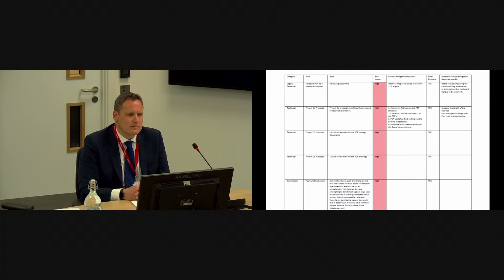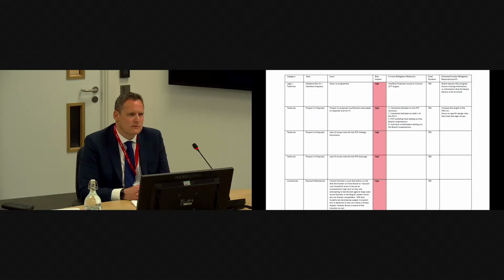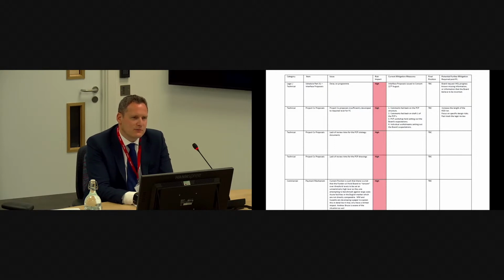By the time financial close was reached, were you concerned about the volume of reviewable design data? Was it more or less than you would have expected on a project of this nature? It was a lot more than we would normally expect. Okay. And would that have been a concern to you, just simply the volume of reviewable design data? Yes, and it was openly discussed with NHS Lothian and IHSL, the concern about this. At the time, it was felt this was something we could manage in the construction phase.